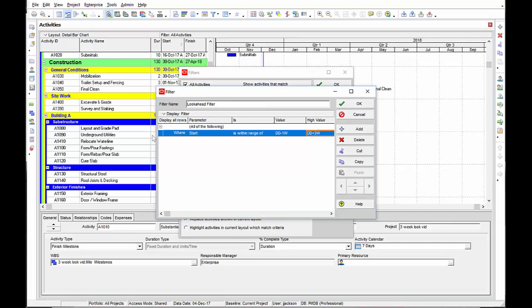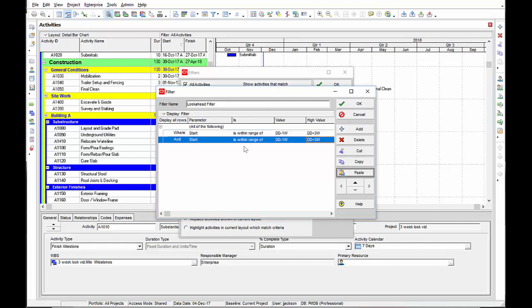This filter parameter will select any activity that's starting within the range of my current data date minus one week. I also want to select any activity that may have started earlier than that but is finishing within that range. To get those activities to show up I can copy and paste the same parameter and just change this selection to finish.